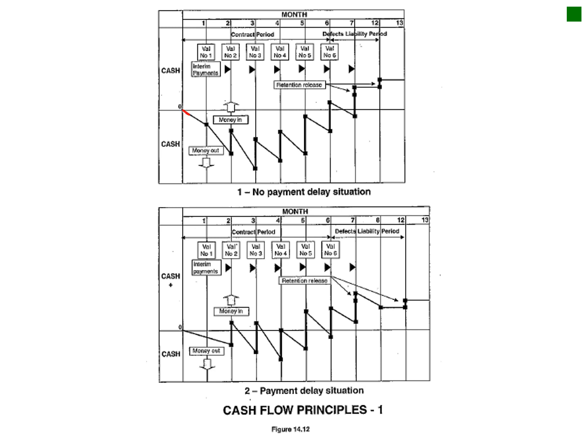You can see you have your expenditure in the first month, you put in your claim, then you do more work and have more cash flow going out, and then you get your first payment. So your cash flow deficit is relieved slightly, but you still have cash outflow, and then you only get your inflow here. You can see how the trend goes, and it's only after month 6 that you start getting a positive cash flow again, although it dips into deficit again after that month. This is a no payment delay situation.